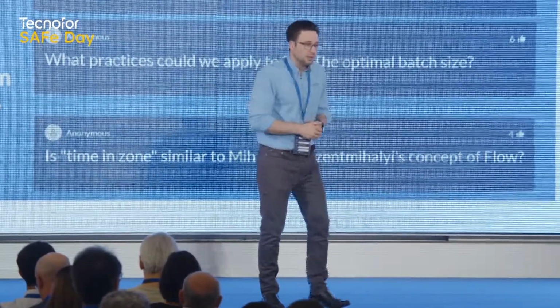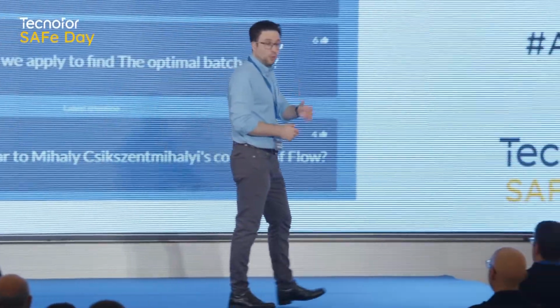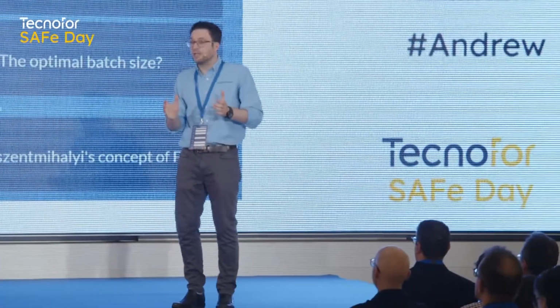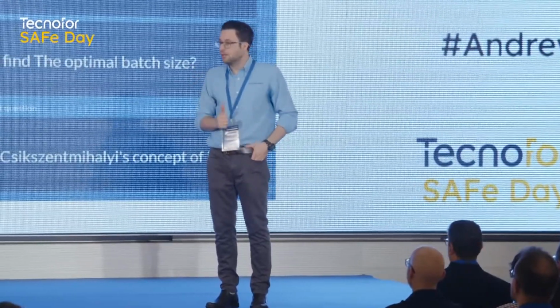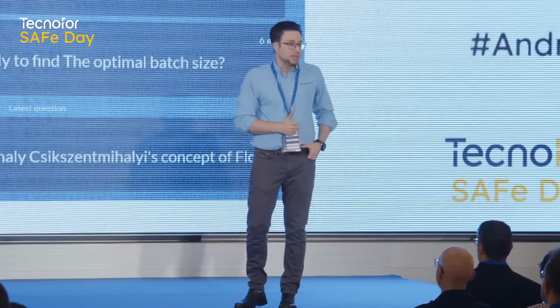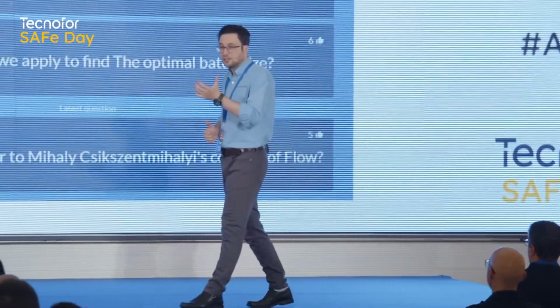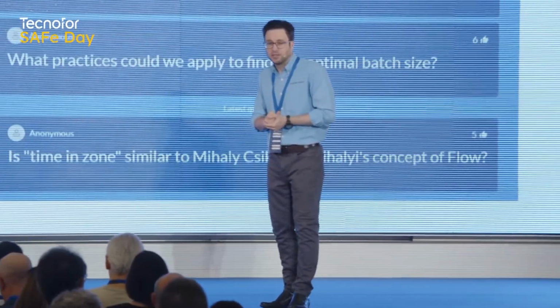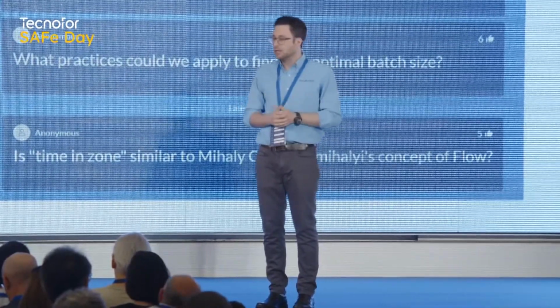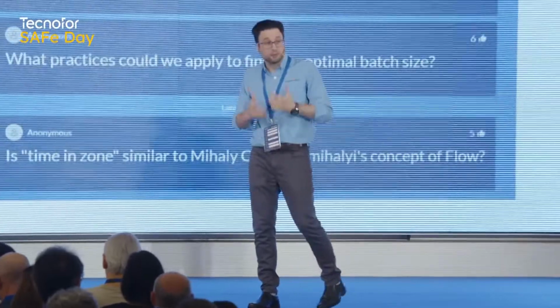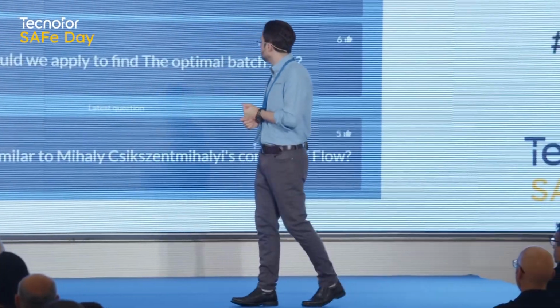An integration batch, do we want to wait 2 weeks to integrate? Probably not. We want to integrate every single day. If we don't, the build will break, the health of the system will degrade. So maybe integrating daily is the right batch size in that circumstance. So we need to play around with the different batch sizes depending on the type of batch it is and the information we're trying to get. So it really is a trial and error approach.